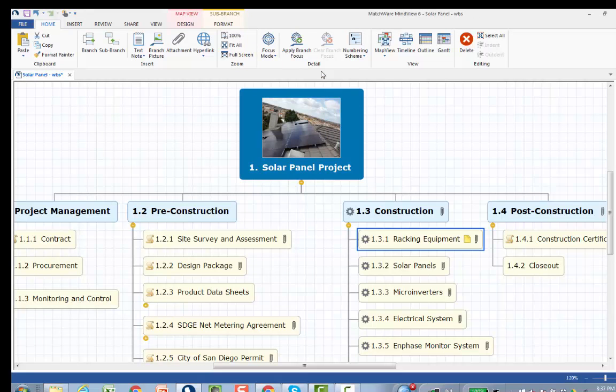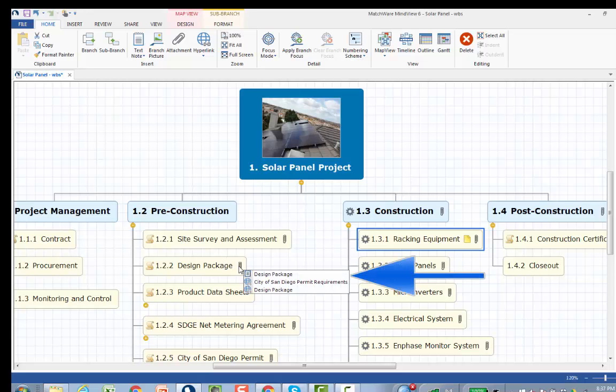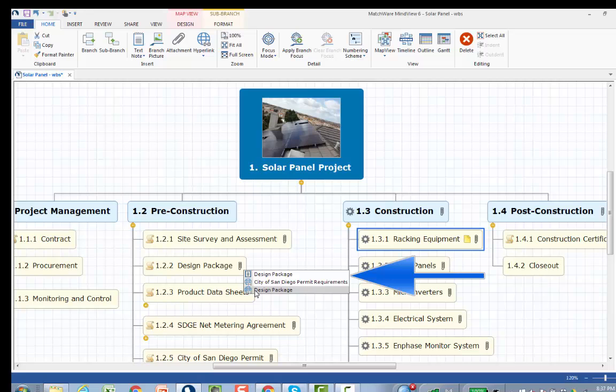The next feature I'd like to show you is I did web research trying to understand the requirements for the city of San Diego permit. Under the design package, I've included a link to the city of San Diego permit requirements and then also the actual design package, the drawings that were created.